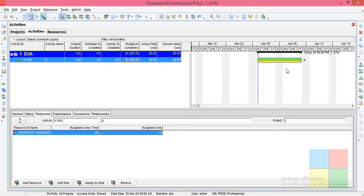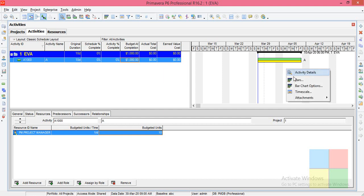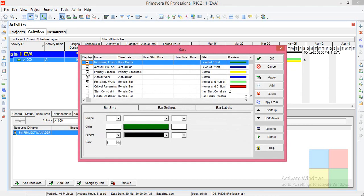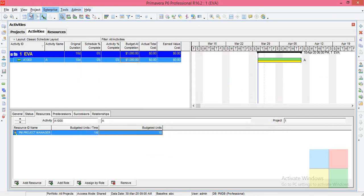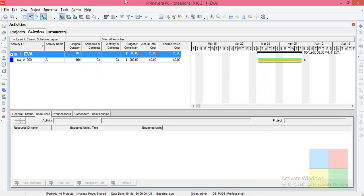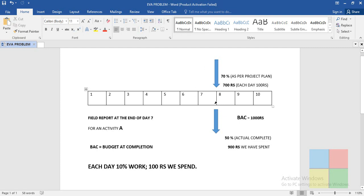Now right-click, go to Bars, switch on the Primary Baseline, Apply, OK. This is the way of creating a baseline. As I told you already, if you see the baseline before you start a project, just go to Bars and uncheck it — we have to check it only after these two procedures. Now let us go to the update part. I want to have this scenario: at the end of the 7th day, I have finished only 50 percent of work by spending 900 rupees, which should have been 70 percent by spending 700 rupees as per the plan.